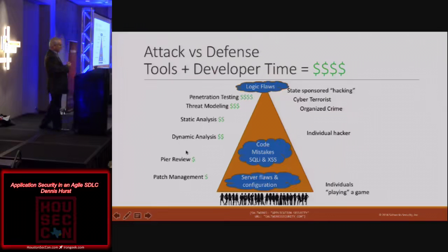You've got to ask yourself the question of who owns the task and who monitors the task. What I mean by that is if security comes and does the test, the static analysis, for example, we'll just use that as our example. If they do the static analysis test, if you want to do it with every application, with every Scrum, and there's 100 teams, and they build every 2 weeks, you just got a retirement plan. You're going to be busy with that for the rest of your career. You can't scale that much.